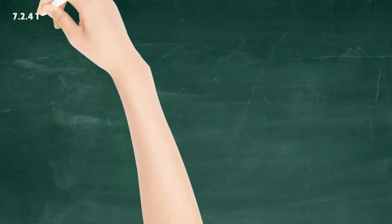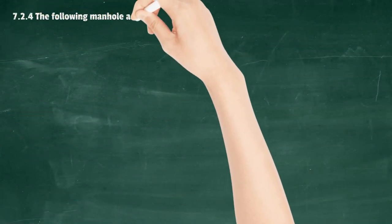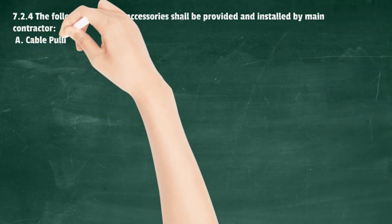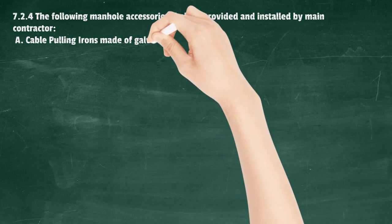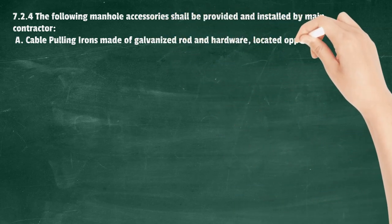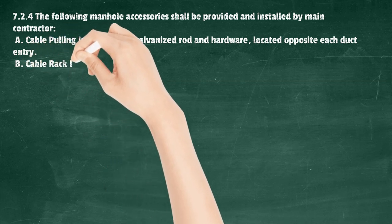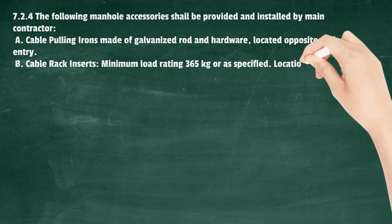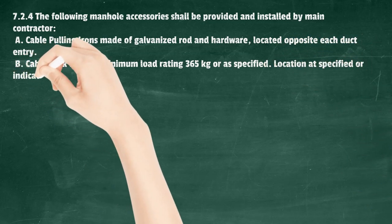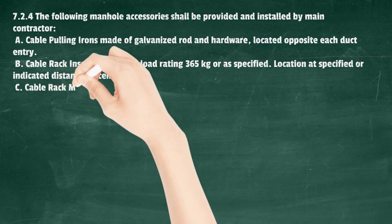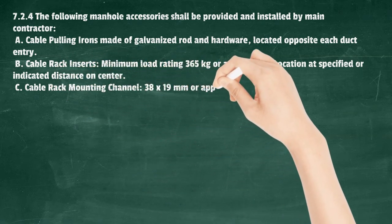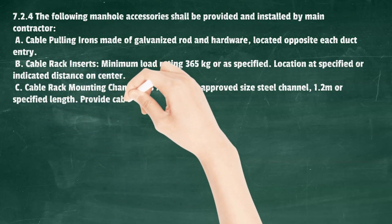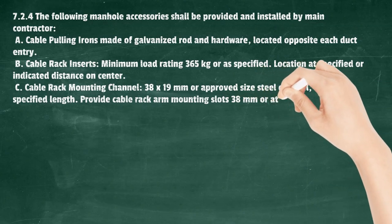Duct bank excavation shall be coordinated with the main contractor. The following manhole accessories shall be provided and installed by the main contractor: A) Cable pulling irons made of galvanized rod and hardware, located opposite each duct entry. B) Cable rack inserts, minimum load rating 365 kg or as specified, located at specified or indicated distance on center. C) Cable rack mounting channel, 38 x 19 mm or approved size steel channel, 1.2 m or specified length, with cable rack arm mounting slots at 38 mm or standard centers.